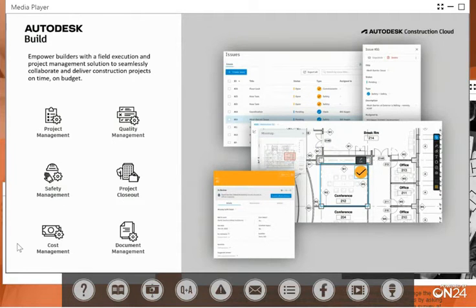And then down in the bottom left there, we've got cost management. So that is a really, really powerful tool for project costing. It's not going to do things like your back of house accounting is going to do in terms of looking at invoices, cutting POs, all of that, but it's going to manage your budget for your project. It's going to manage all of your costs, your expenses for the project, and it has a change management workflow that can move things from a potential change order all the way through to an approved owner change order and subsequent supplier change orders for any pricing adjustments.